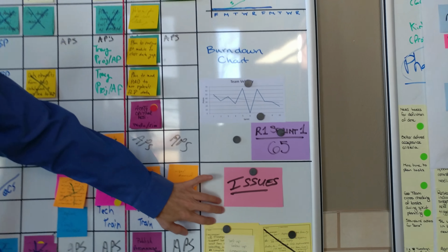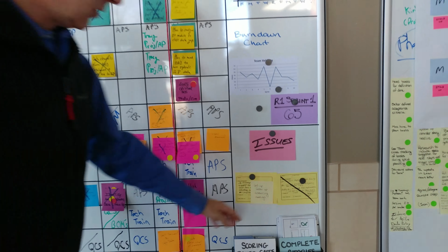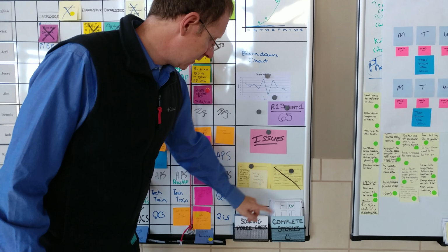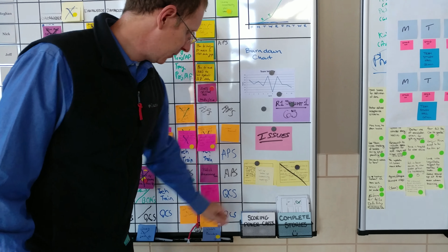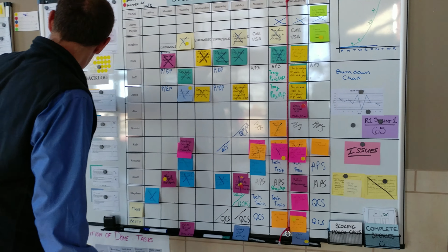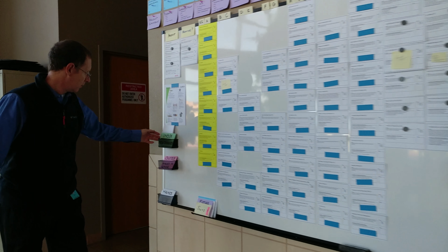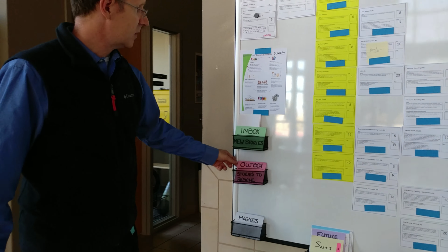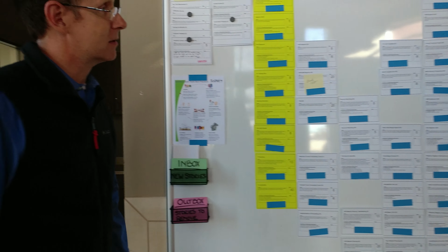And then this section is used for issue management. You can see that around the boards, there's a number of things that are staged, like here are the completed stories that have been done. Here is material to actually size stories using planning poker cards. Back on the left, we had bins to hold stories that required review, stories that were going to be taken out of the queue, stories that were being considered for future releases.